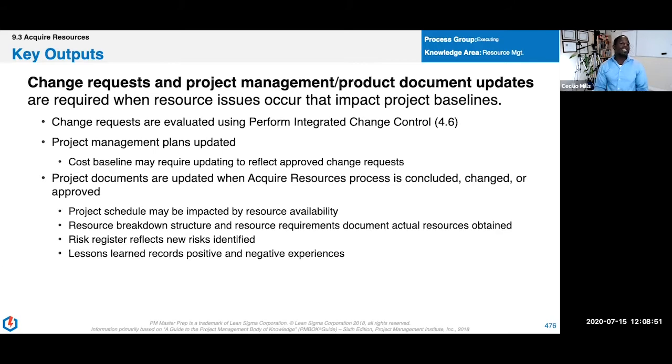All right, then we look at change requests. These are outputs in project management or project document updates. As we acquire these resources, obviously, we may change our approach to how we deal with the schedule or how we deal with the risk. Maybe now that we have this additional room, we're going to update our risk management plan and say that all risk activities will now take place in this room. See, not necessarily changing the project, just changing our approach, okay?